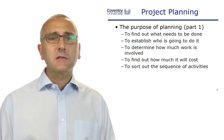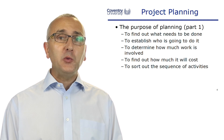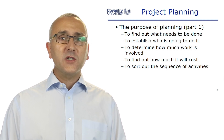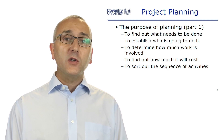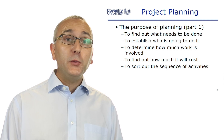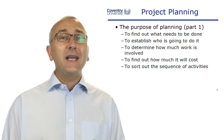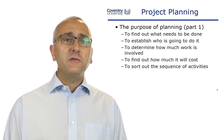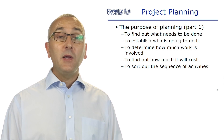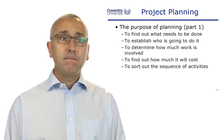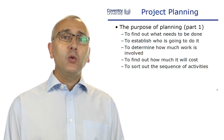But why are we creating plans? What is the purpose of planning? We need to find out what needs to be done — that's the purpose of the work breakdown structure. We need to find out who is doing the work — that's the responsibility matrix. We need to find out how much work is involved and how much it's going to cost — that's the purpose of the cost account. And we need to sort out the sequence of activities: what comes first, what comes second, what can be done at the same time — that's the purpose of the dependency chart.